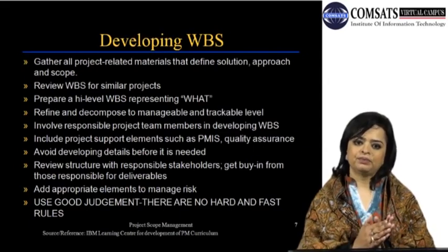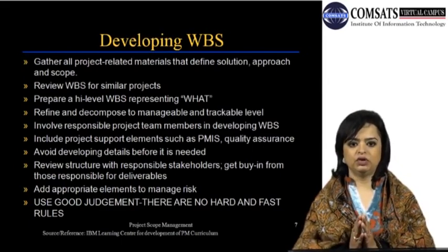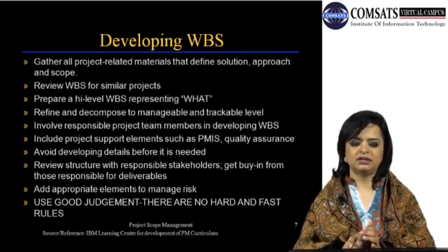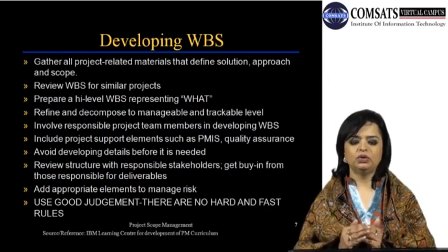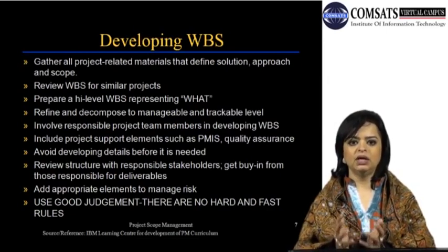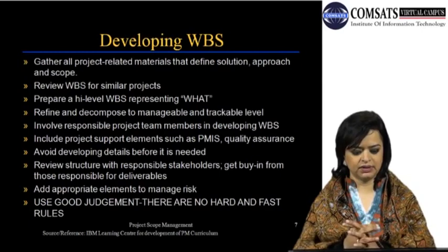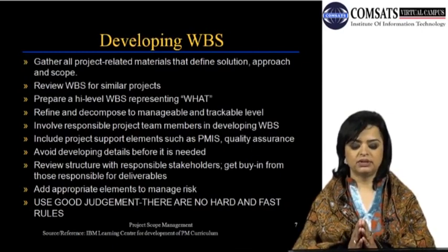Involve responsible project team members in developing the WBS. An activity that I kind of gave you in the previous slide. Whoever is involved with your project at that point in time, and adding on some subject matter experts, some consultants, or some other team members who have done similar projects before, get them together in a team environment, in a room, and start drilling down into subsequent levels of activities. So involve responsible project team members in development of the WBS. Include project support elements.